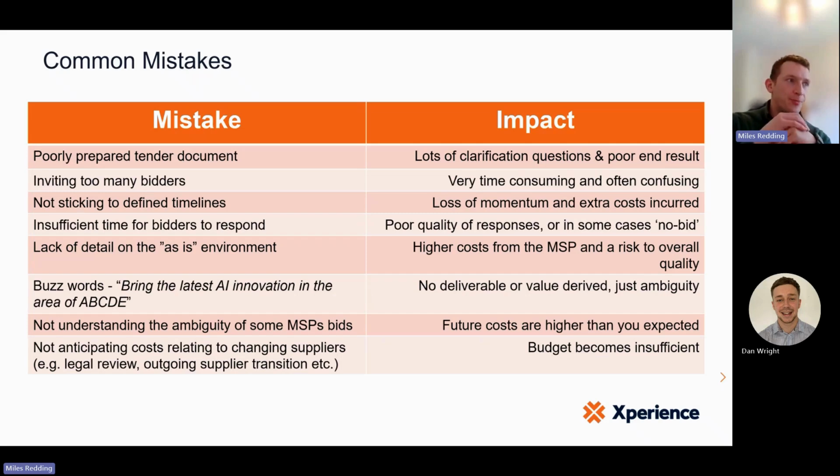And then not granularly clarifying bids is the other element of it, which is this one here, the second from the bottom. So understanding exactly what a bidder means when they say something. If you're unsure, ask that clarification question, which is why we baked that into that evaluation period of 4 to 8 weeks, because you should be going back to clarify it. Once you've signed that contract, it's almost too late. You've contractually committed or contractually procured a service. So if there's any element of uncertainty, ask as part of that initial process.